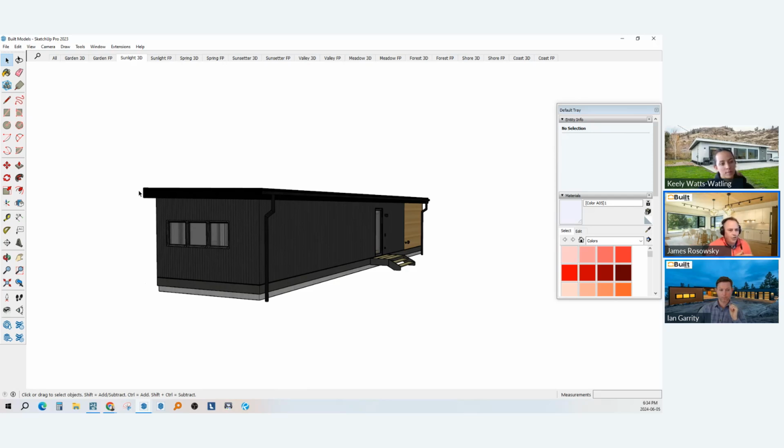Additionally, there are restraints about what time of day a really big and wide unit can go down the road. But at 14.5, it can pretty much go down anytime. As far as length goes, the longest we build is 62 feet. And that's just because of the truck's length and the factories and all of that.